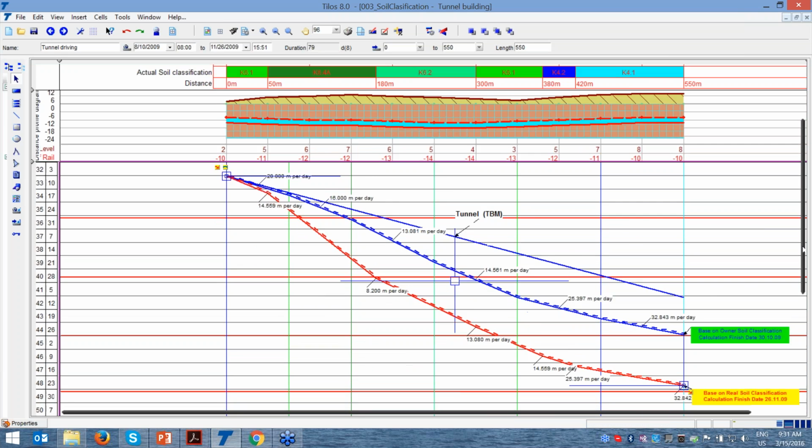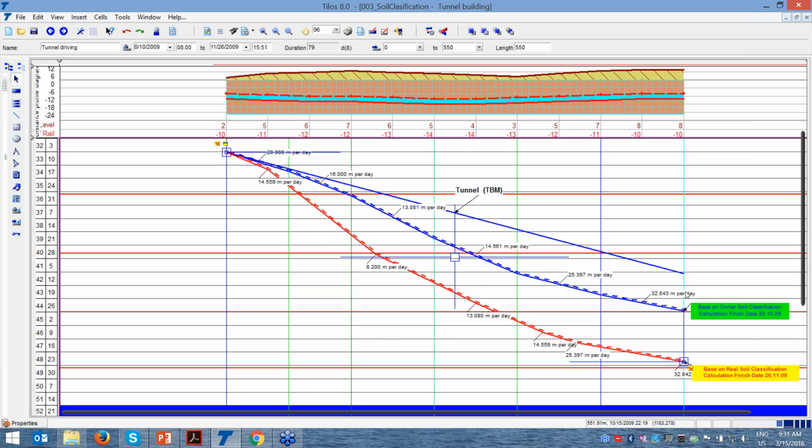If it isn't the case, you can really see it here, so be careful. This is also a subject about the claim, because this can also represent the client, which is that we were expecting and agreeing on that kind of soil types, but unfortunately this is the reason why we are delayed, so that we can ask for a time extension. If possible, of course, we can ask for extra money.